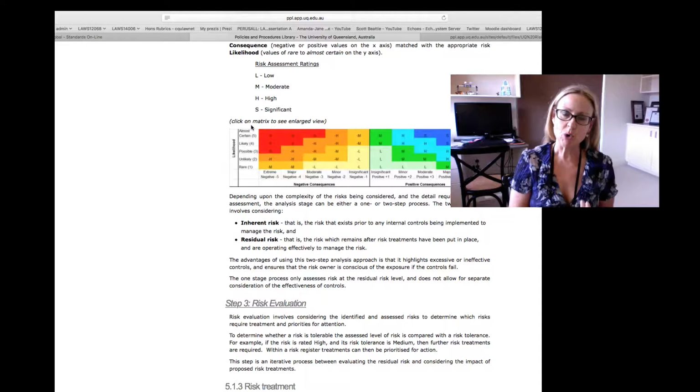You need to know what your organisation's risk profile is. Is your company or your organisation risk averse? That is, they have to be very conservative in the way that they treat their risks, and practically any risk, apart from a nil risk, needs to be tempered with some kind of control measure. And that's particularly the case in, for example, the health services industry.